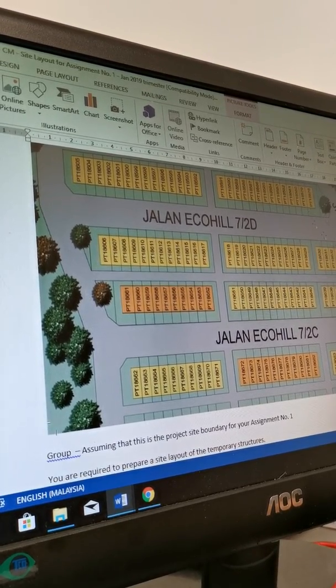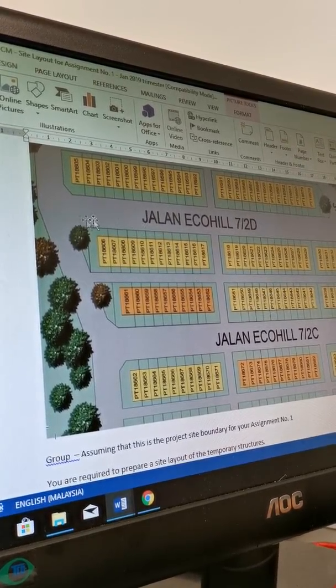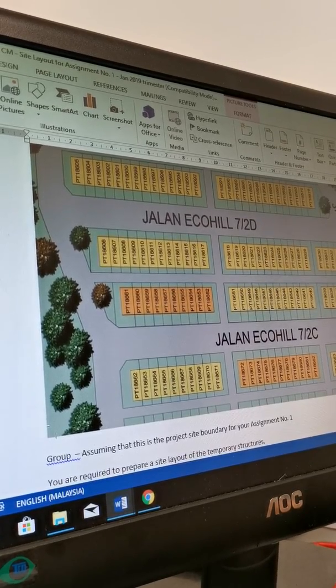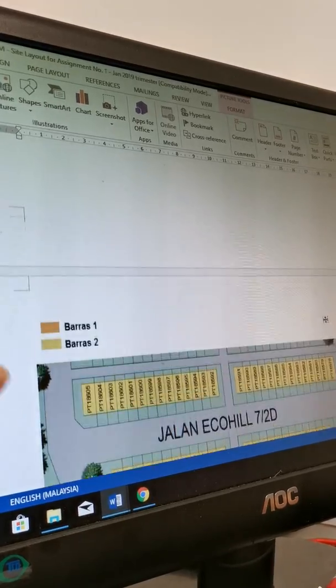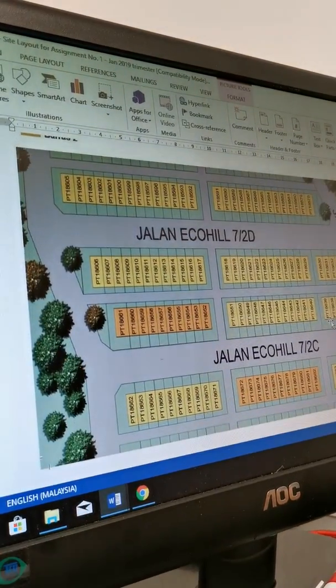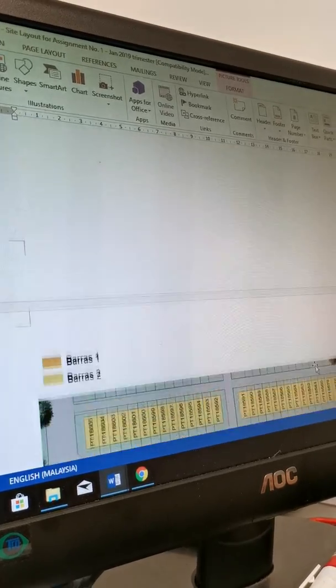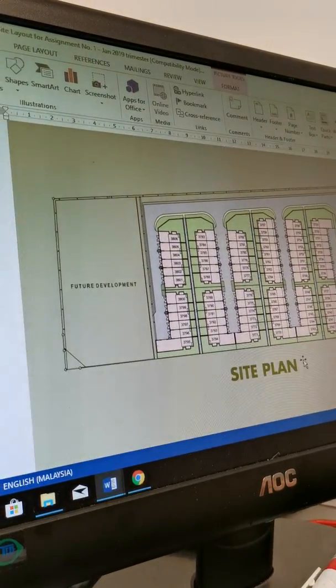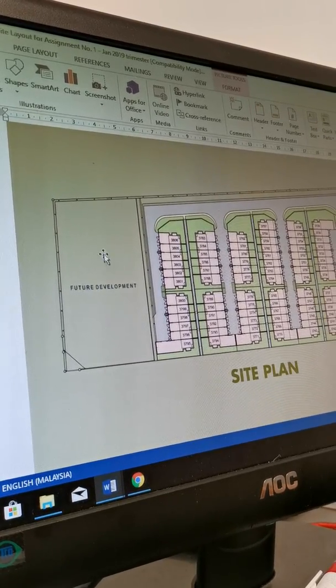So usually these are the things. Usually try to avoid road area because there's a possibility there is a sewage line running here, or certain services running there, and so on. If no choice already, then you may have to do that, then you write the reason why. We need to identify the sewage system. This project is this way. You only use the green space there for all these things, or here for future development things.